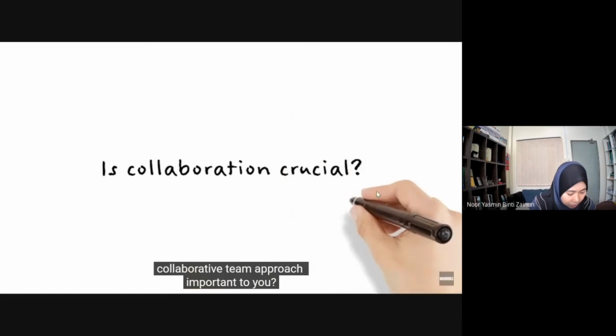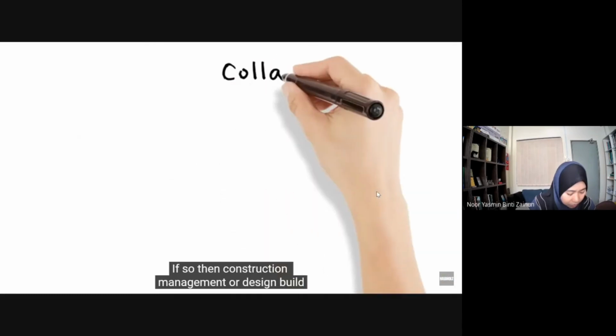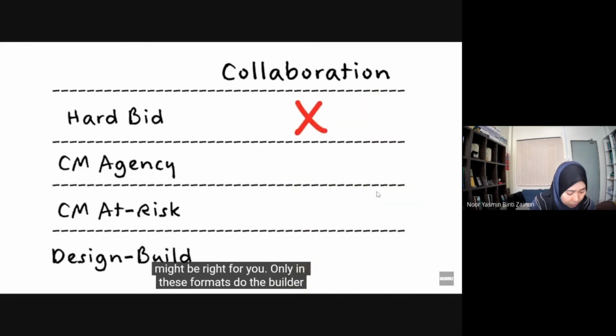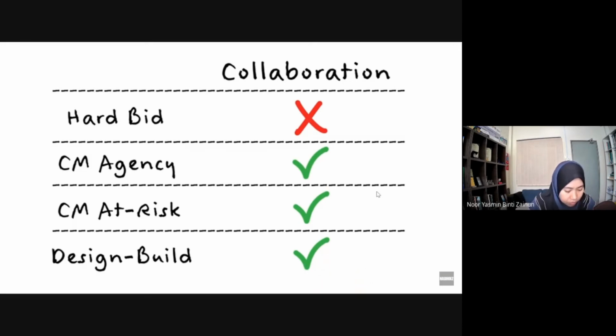Is a collaborative team approach important to you? If so, then construction management or design build might be right for you. Only in these formats do the builder and designer work together during pre-construction to predict and solve potential problems on paper before they become real problems on your job site.